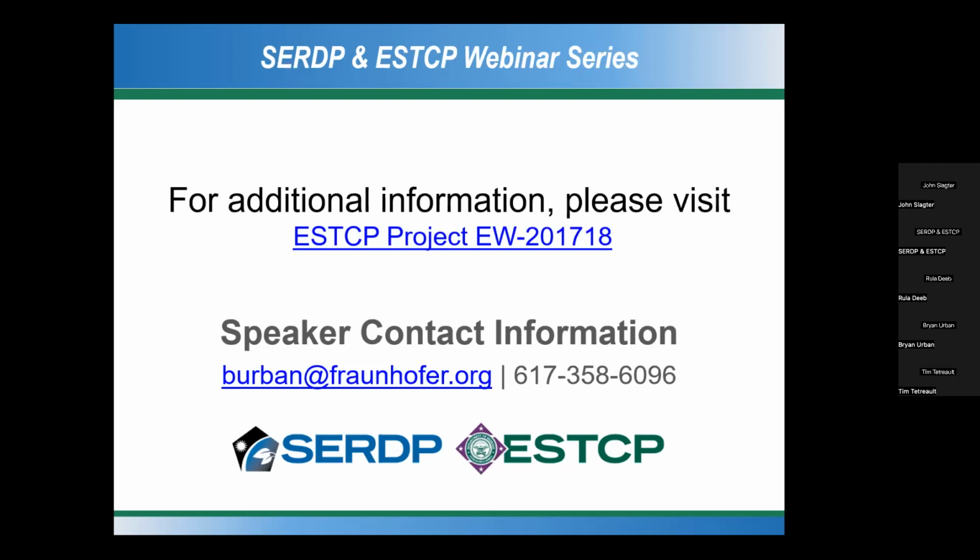Yeah, that's a great question, and I could probably spend another hour on that topic. But very briefly, we did need to go through some cybersecurity documentation process and things like that. So DoD has their risk management framework process and their authority to operate process, and depending on what service you're working with, they might have templates for vendors or contractors to start with. But in our case, there wasn't a ton to do, but there were a few key steps. So one is you need a system inventory. So you need to keep track of all your fixtures and serial numbers and where they go and all that stuff. Much of that information can come right from the platform.